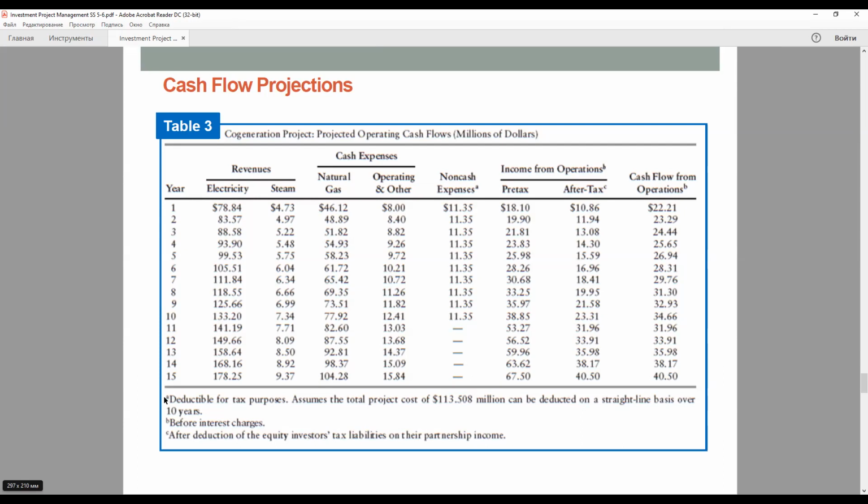An error frequently committed when making cash flow projections involves escalating revenue items at one rate and cost items at another rate, without any real justification for doing so. When these escalation rates differ, it is important to furnish an explanation along with the projections.